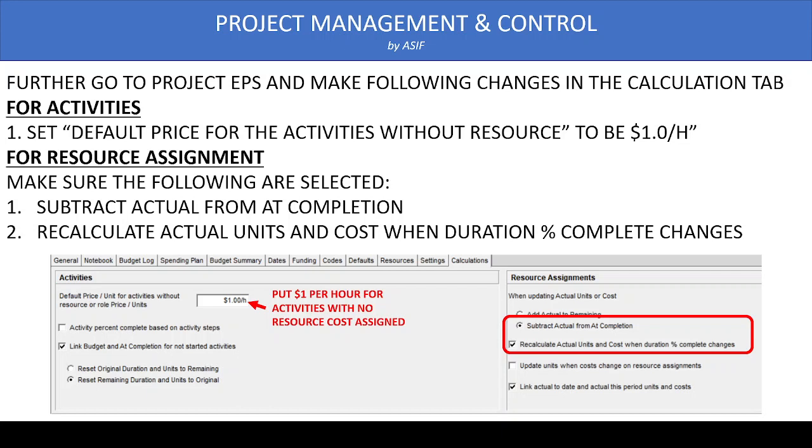In the calculation tab, we assign $1 per hour for the activities without resources, and we select subtract actual from at completion and recalculate actual units and cost when duration percent complete changes. We make sure that both these are selected and that $1 per hour is assigned for activities without resources.